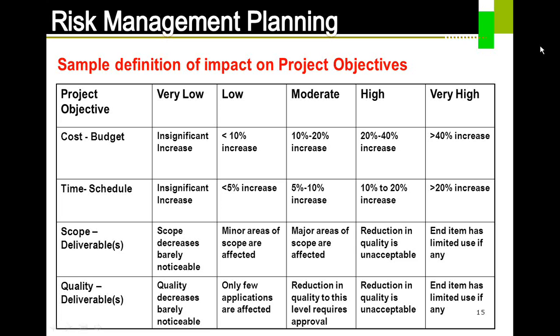Again, as I said, it would change from organization to organization and project to project, and it will also change with the environmental factors. What I mean by that is, as you know, right now there is a Eurozone crisis, and people have been saying that there is going to be a recession. In this scenario, maybe I would categorize even an increase of 10 to 20% as very high, because in the current scenario money is very important to me. Versus suppose there is a government regulation, and I for sure need to implement this project. In that scenario, time or schedule is going to be more important to me than the cost. So that's how it has to be changed or done.